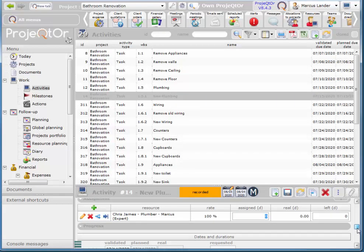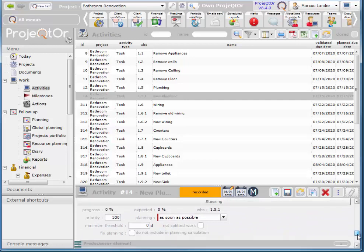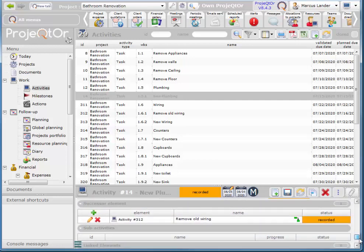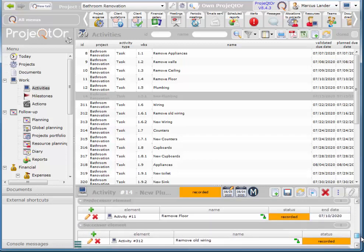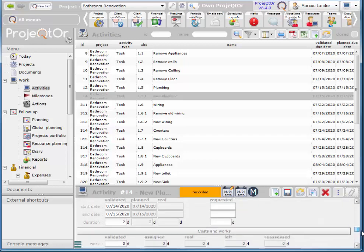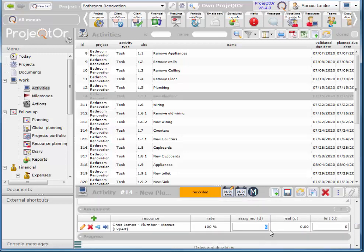So you'll see that if you scroll down, we have the duration that we've added. So we want to assign the plumber to that duration. If you have two resources working on the same task, they may be working one day, and then another resource may be working another day. So we can have as many resources assigned to a task as we like. And I'll go ahead and save.